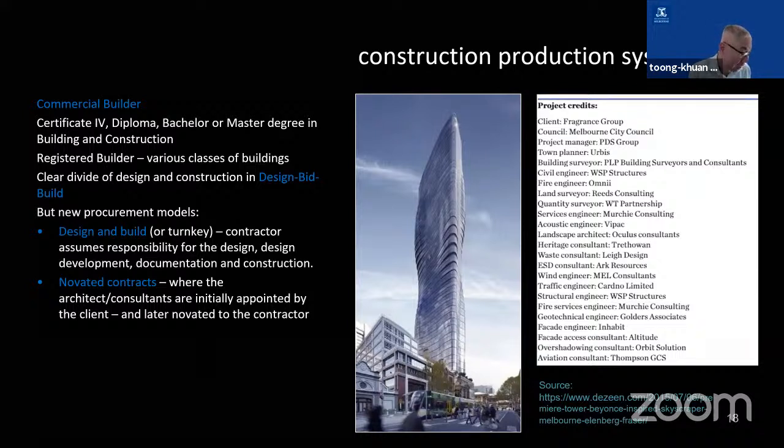Even the building that I am working in, the architecture building at the University of Melbourne, was procured using this method. There was a design competition. The architecture firms competed. The winning firm commenced the design. After preliminary design was done, they used it to ask contractors to bid. Once they decided on the winning bid, the winning contractor took over the contract. So that's how we divide the design and construction responsibilities generally for commercial buildings.